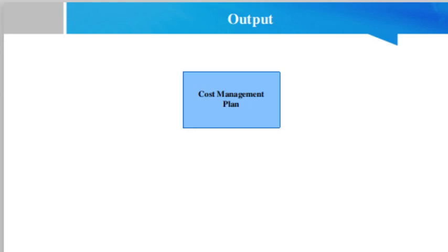The output of the Plan Cost Management process is the cost management plan, which is a component of the project management plan. It describes how the project cost will be planned, structured, and controlled. The cost management plan can establish the following: units of measure — each unit used in measurement such as staff hours, staff days or weeks for time measures, meters, liters, tons, kilometers, or cubic yards for quantity measures, or lump sum in currency form — as well as level of precision and level of accuracy.